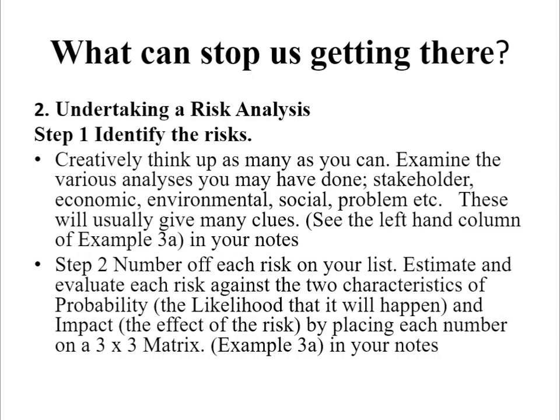So, when undertaking a risk analysis, the first step is to identify the risks. Creatively think up as many risks as you can. Examine the various analyses you may have done, for example, stakeholder, economic, environmental, as well as social problem. This will usually give many clues. See the left-hand column of example 3A in your notes.